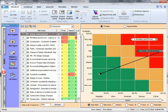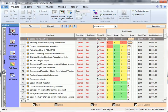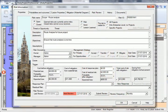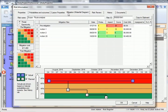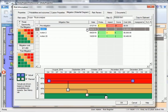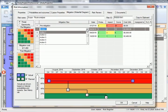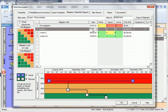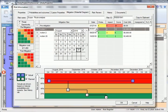Once you have entered the plan, it can now be assigned to a risk using the mitigation waterfall chart. Open the risk information dialog box of the risk to which you want to assign the mitigation plan and click the mitigation tab. On the left, you can see the pre-mitigation and post-mitigation status of the risk. Click in the first row and select the mitigation activity you want to assign to the risk and add an estimated date of completion.